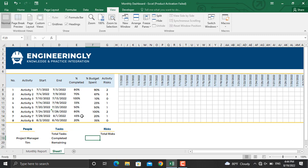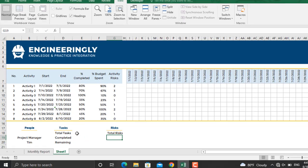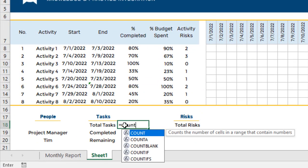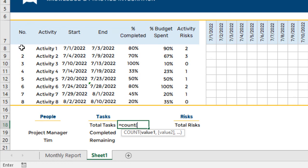As you can see, we have the activity names, start and end dates, percentage completed, percentage budget spent, and risks for each activity. This is normal data entered into Microsoft Excel. The first thing we are going to do is calculate the total number of tasks. In the cell next to 'Total Tasks,' I'll write an equal sign, then COUNT, open parenthesis, select all the tasks, close the parenthesis, and press Enter.